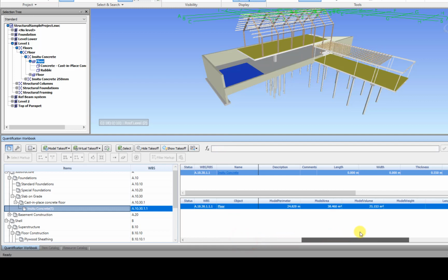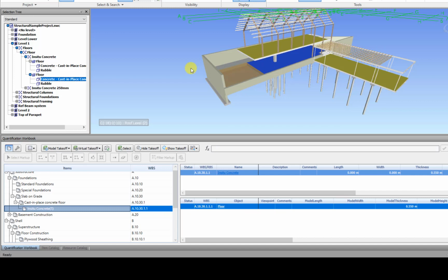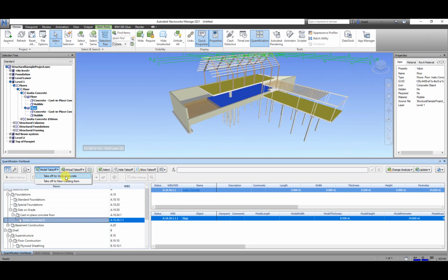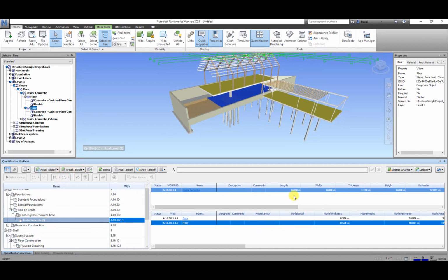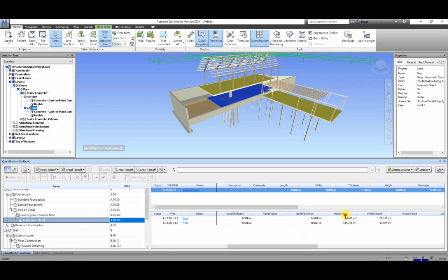And once you assign it, then it can pull all the geometric properties of this instance. So far it's one element, but if I select the other two elements, select the higher level of this, and then add it to take off to this one, you can see I moved from one element to two elements. My total quantities for the different attributes, if I move to, let's say, the area, it's adding up the area values for the whole group, for anything under this group.